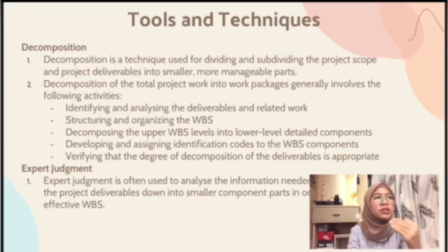Different deliverables can have different levels of decomposition. To arrive at a work package, the work for some deliverables needs to be decomposed only to the next level, while others need additional levels of decomposition. As the work is decomposed to greater levels of detail, the ability to plan, manage, and control the work is enhanced.